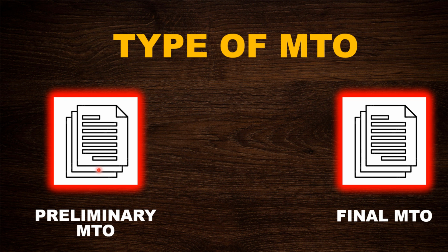So you will have to wait for 3 years. But at the same time, if you can start the list of materials at the beginning of the project, imagine that your project has gone for nearly 2 to 3 years. By the time you complete your project, you will be able to receive most of the materials. So that is why preliminary MTO is one of the important MTOs, because that is going to play a key role in the duration of the project actually.